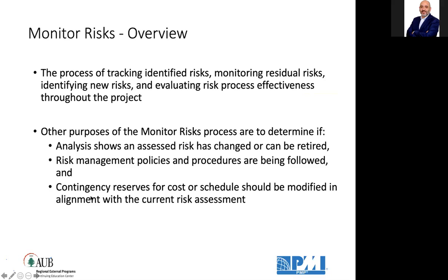Is it still applicable or not? Risk management policies and procedures are being followed in accordance to the risk management plan, and contingency reserves for cost or schedule are modified to be in line with the current risk assessment.